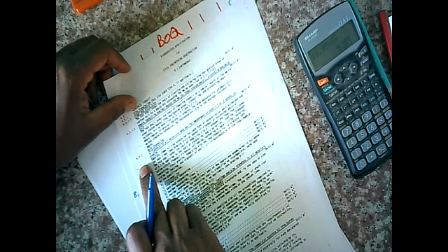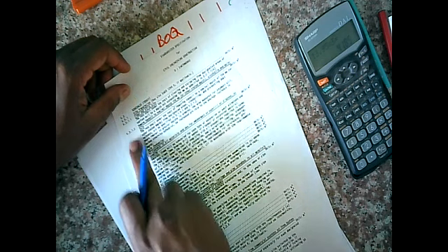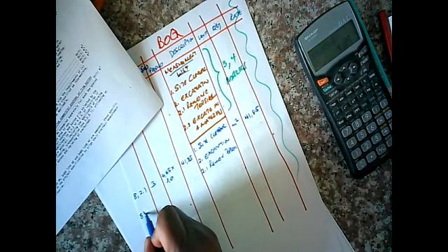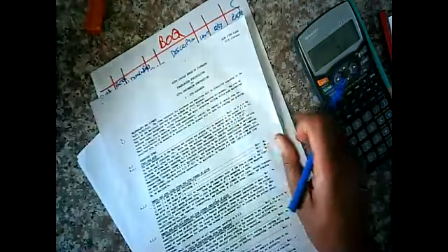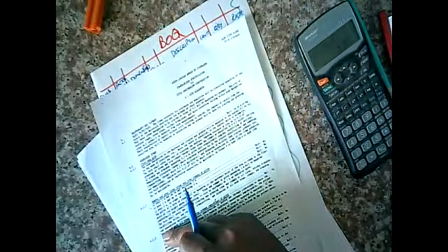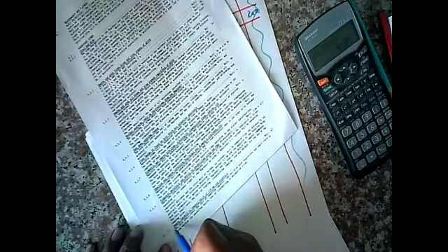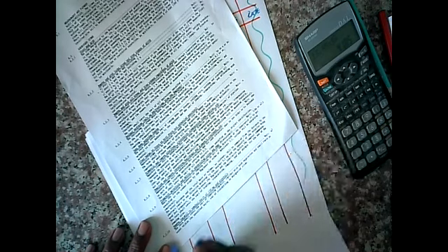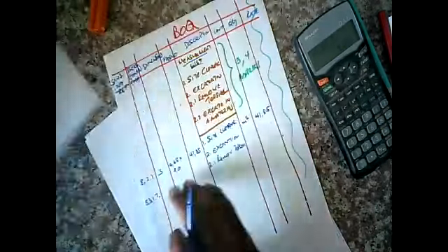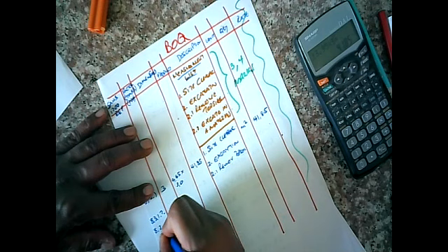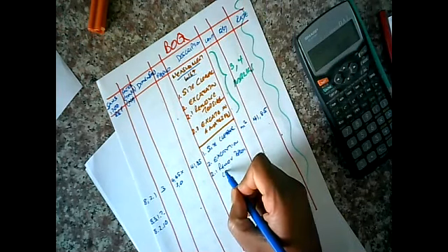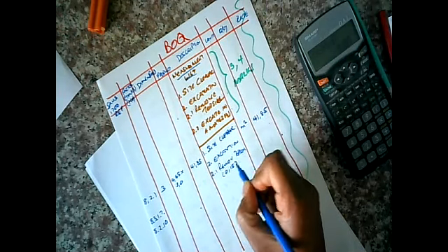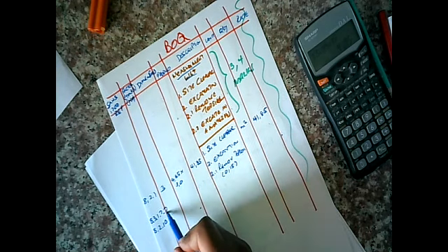Right. What is the value? Here's one: 8312. Or alternatively, you can also use the last one. If you remove topsoil, normal depth 150 millimeters, meter cube, so 8210 or 8.2.10. Either one, because they all make reference to 150 mil removal. So any of these two is good enough.